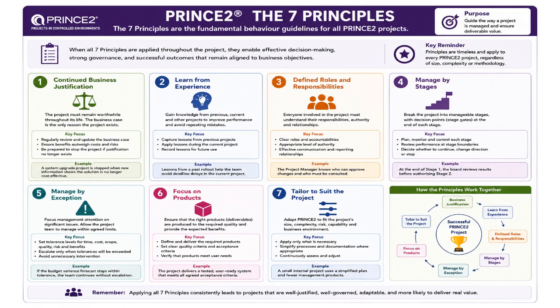The business case is therefore not created once and forgotten. It must be reviewed and updated throughout the project lifecycle. If the project no longer provides sufficient value, it should be changed or stopped. This principle ensures resources are invested responsibly and strategically.